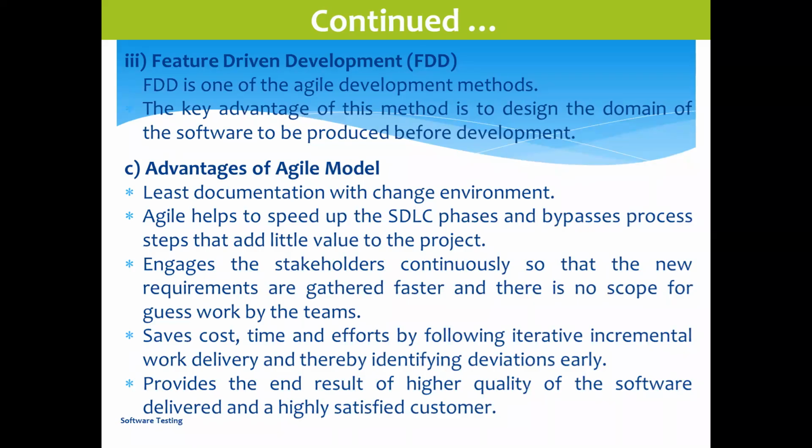It is not like "my health issue is there, I could not complete." Those will not be considered. The team will manage, another person can do it. So if anything is pending, it will carry forward to the next sprint. Again, if not complete, it will go to the next sprint with some valid reason, and that valid reason should be approved by the client also. If it is a valid reason, then obviously they will approve. It is not like we can only take the decision and carry forward to the next sprint. No, the client or customer will give the approval, and you have to show some valid reason.